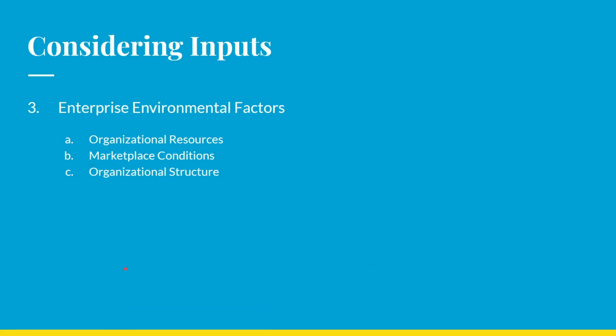So, and the enterprise environmental factors, that are three we should consider. There is existing organizational resource, that including availability, competence level, or prior experience for team resources, marketplace conditions, and organizational structure.